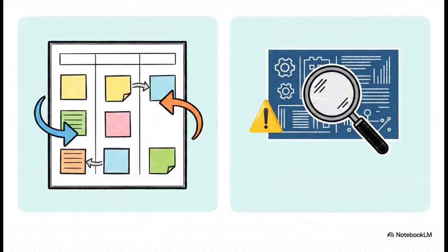Now, in the Agile world, we love to talk about how much we welcome change. We want to be responsive to users and adapt to late learning, and that's great. But in medical device software, welcoming change absolutely does not mean you get to escape impact analysis. Look, in your digital tool, dragging and dropping a ticket looks exactly the same whether you're just reshuffling your week's work or completely rewriting a core safety feature. But legally, they are worlds apart.